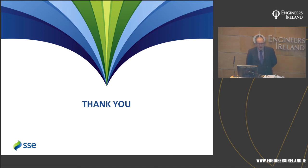It's very difficult to say. I wouldn't be able to put figures on it in reality. I suppose it's really a question of where it will impact you. I would say it is really in the area of schedule. If you can achieve schedule control through EPC and get generating, you're then immediately in the market and making revenue. I think that's probably one of the biggest issues: how soon can you get the plant operational and finished. You probably have fewer schedule risks when you do it in an EPC mode rather than EPCM. But as I say, it depends. In this case, I wouldn't be able to make a comparison, because the way it was done was a feature of the situation that we faced at the time.